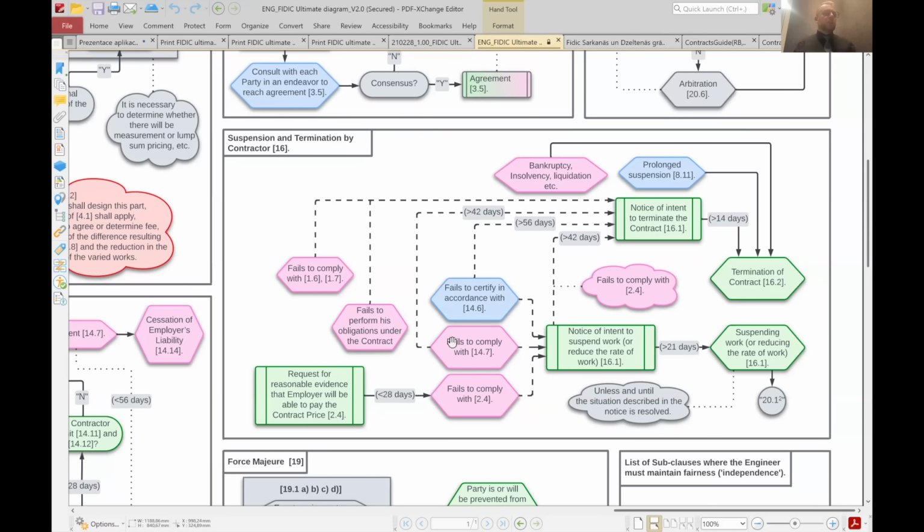I actually had a few projects where the contractor was suspending because the employer owed the contractor quite a lot of money. Even on the approved invoices, there were quite a lot of millions that were approved but just not paid, and the contractor decided to suspend the project, which cost around 200 billion euros. I was the contract manager on the side of the contractor, helping to lead the procedure on how to suspend the work. It was nothing pleasant. It was really nothing pleasant.